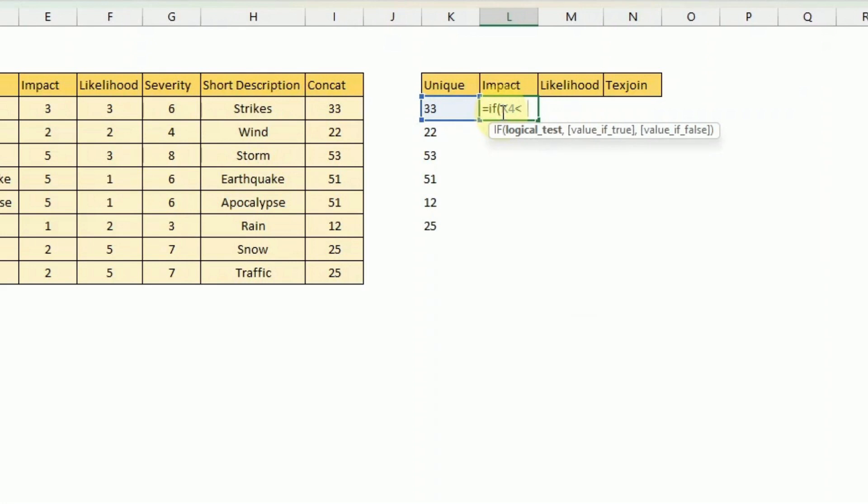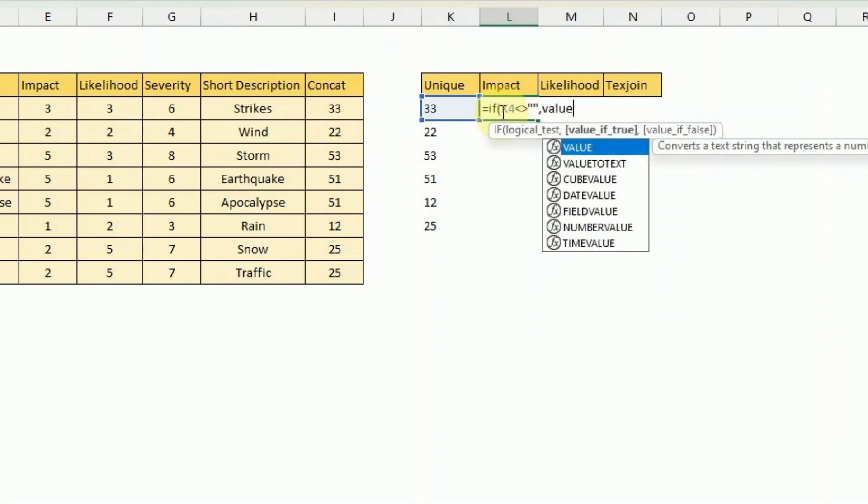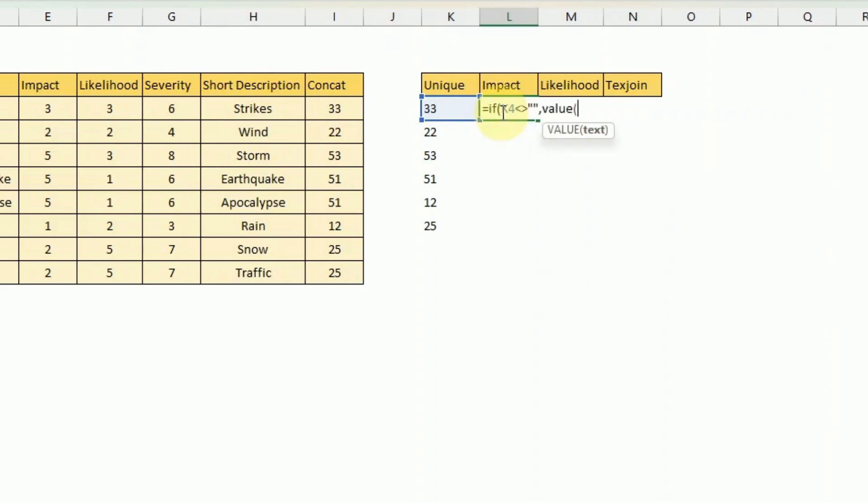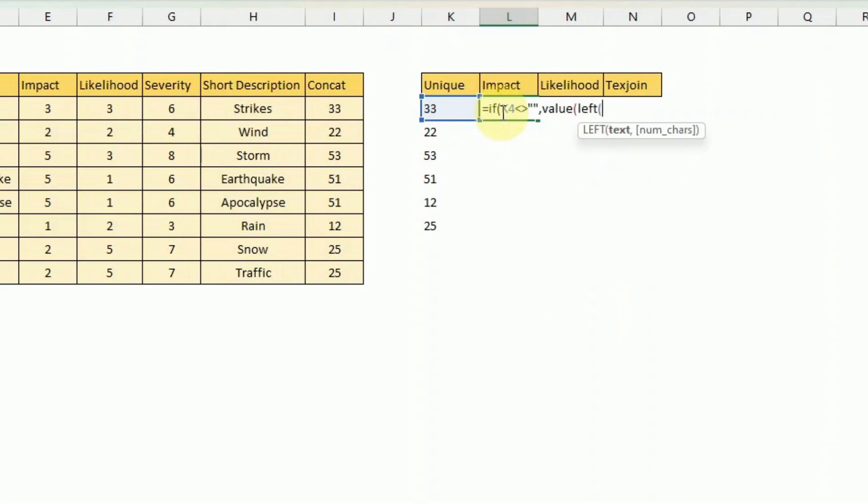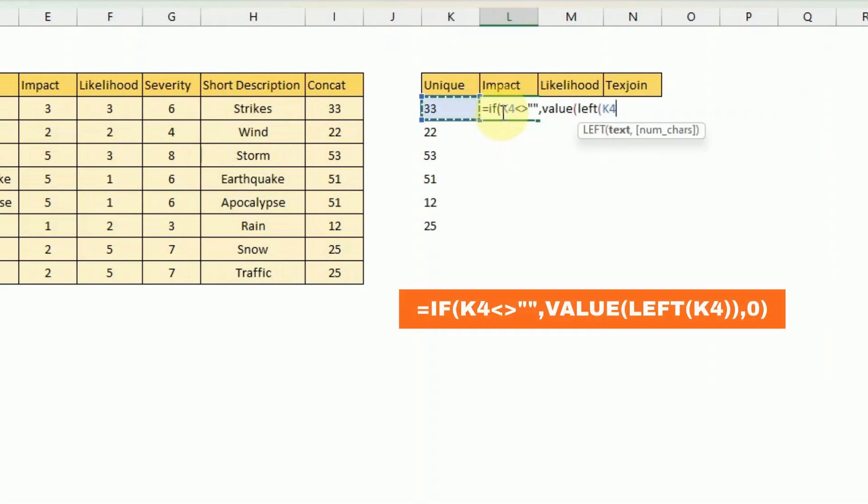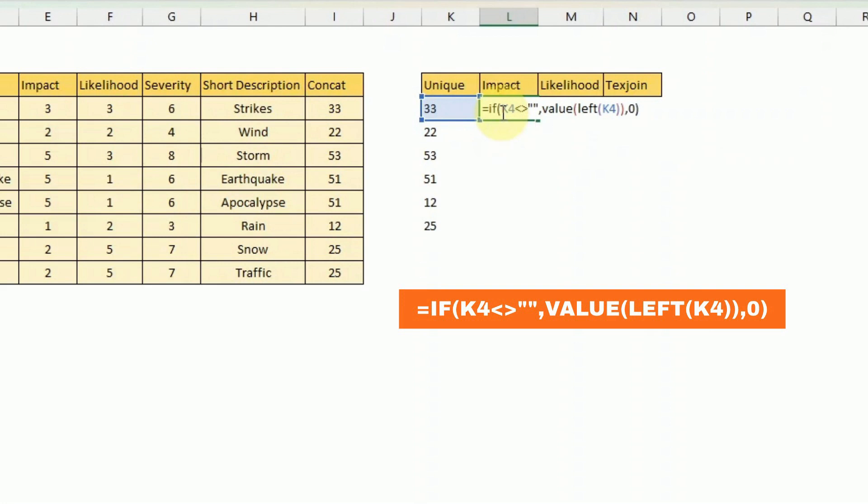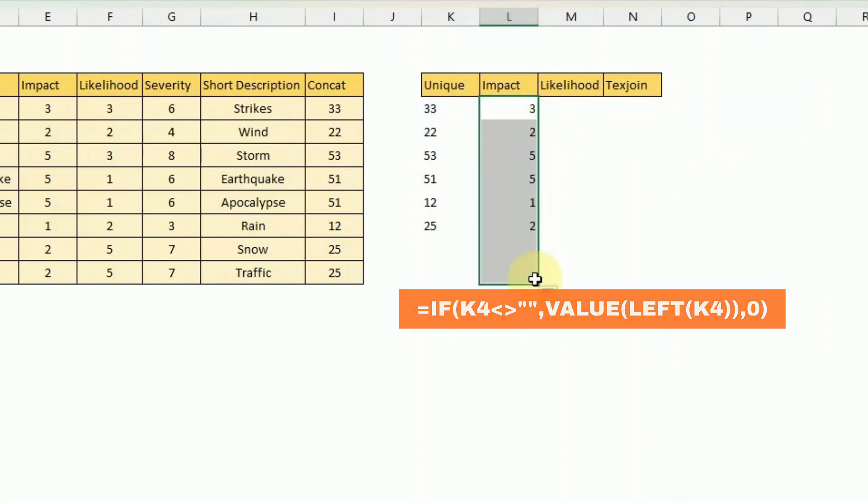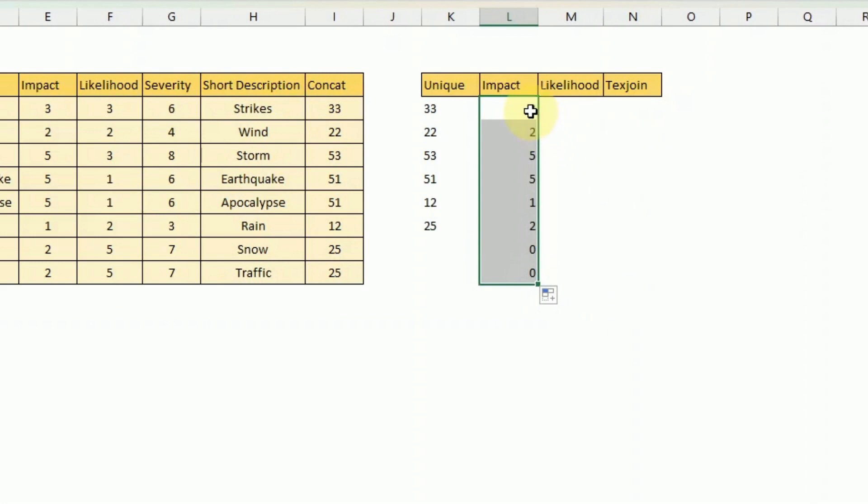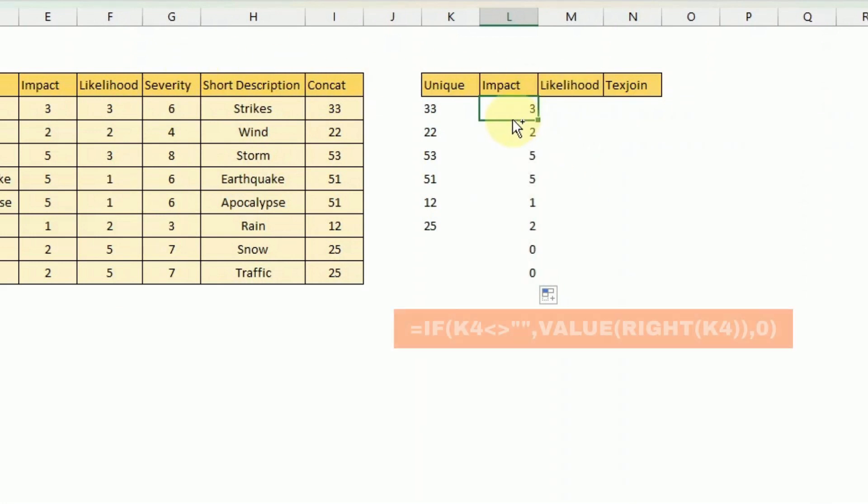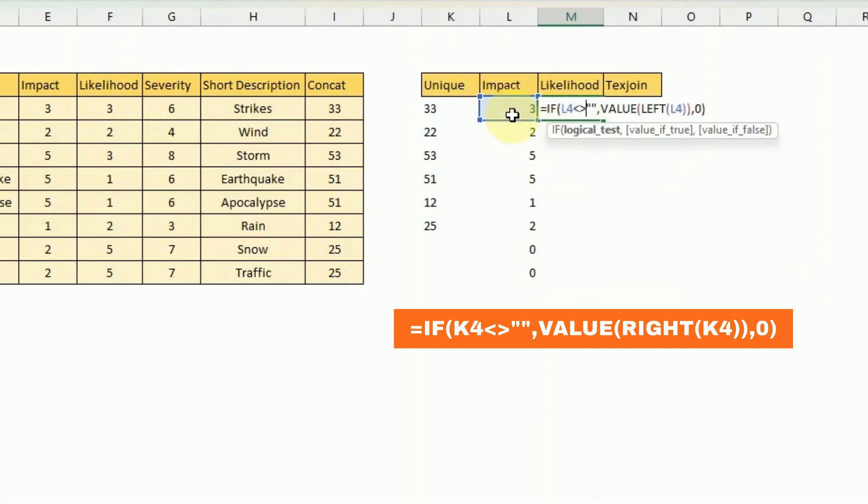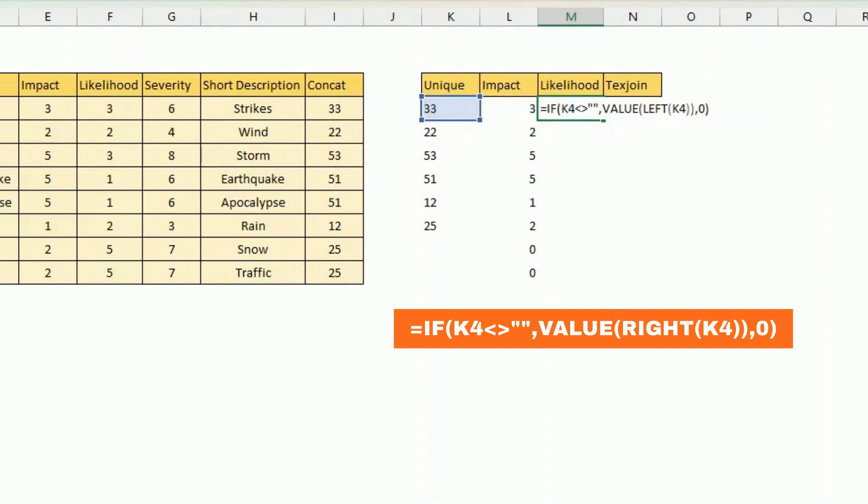What we do for this is we just check that the field on the left is not blank and then we retrieve the left value of this unique column. But as it's going to give us a character here we just put value to ensure that we have a number because to work with charts we need to have numbers. So we just do this and we drag it down and then we do the same with the likelihood. The difference is we extract the right value of this concatenated field. So we have unique impact and likelihood now.